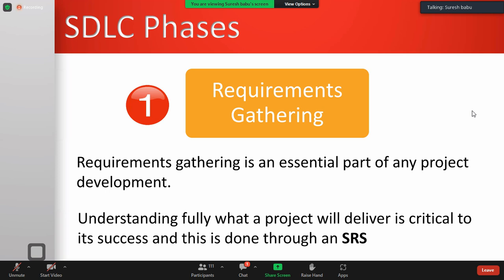Nowadays, not in the very beginning days, when the requirement documents are prepared, before delivering them to the next level design team, the senior BA will go back to the client again. Whatever they have documented, they will explain to the customer: in the last 10 days, this is what we gathered from your employees, and this is what we are trying to build for your business. If you say okay, then we start. What is the BA doing here?